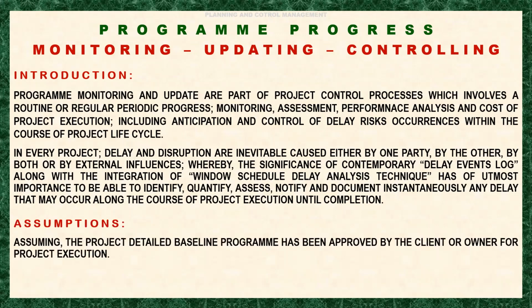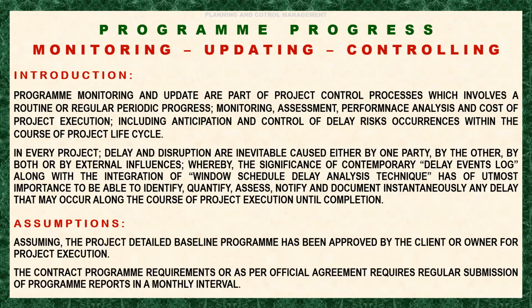Assuming the project detailed baseline program has been approved by the client or owner for project execution, that means it is ready to be used for project execution. And here, the contract program requirements, or as per official agreement, require a regular submission of program reports in a monthly interval.